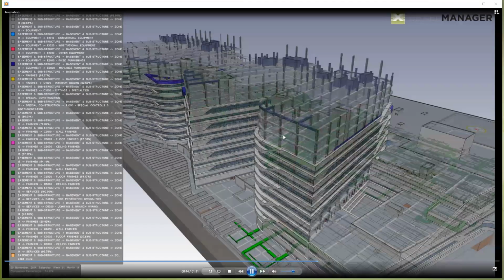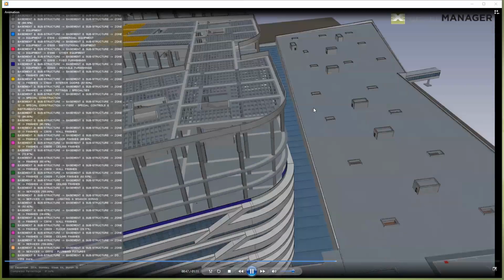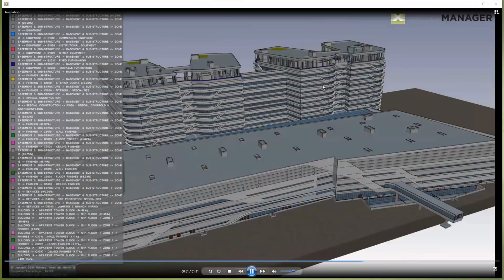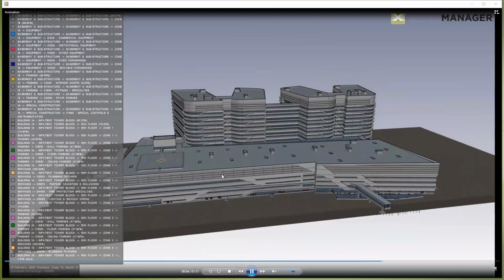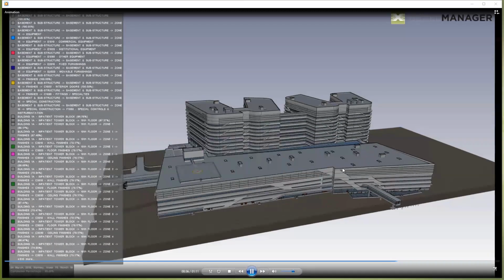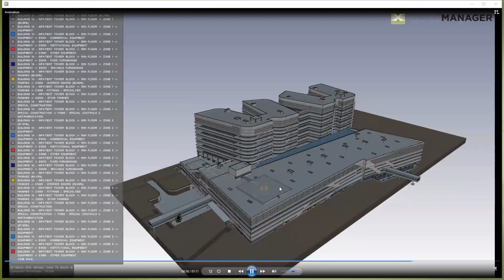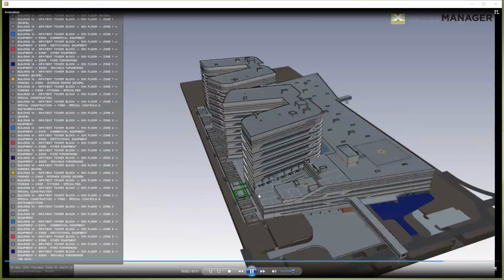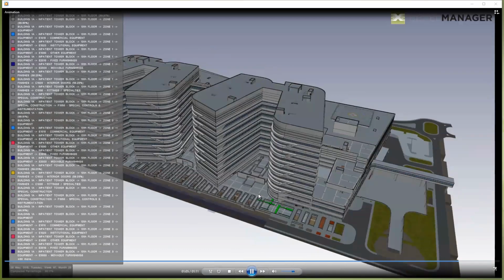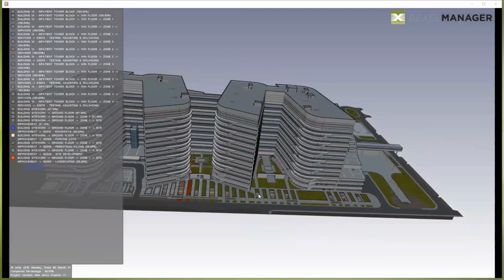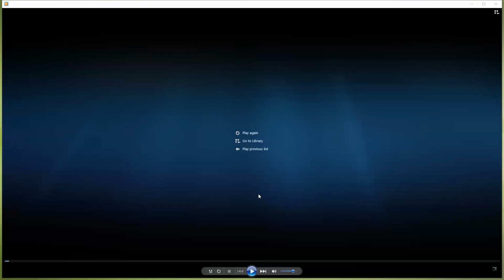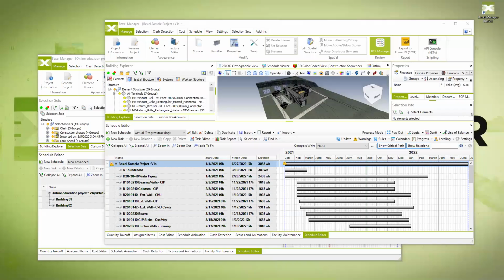And we also had, I think, almost 10 or 11 phases, because each of these parts of the buildings was different zones. And also the lower part of the building was also different zones. And for the hospital, we had more than 70 different activities based on the classification. And these activities are also segregated in 2 levels of methodology.